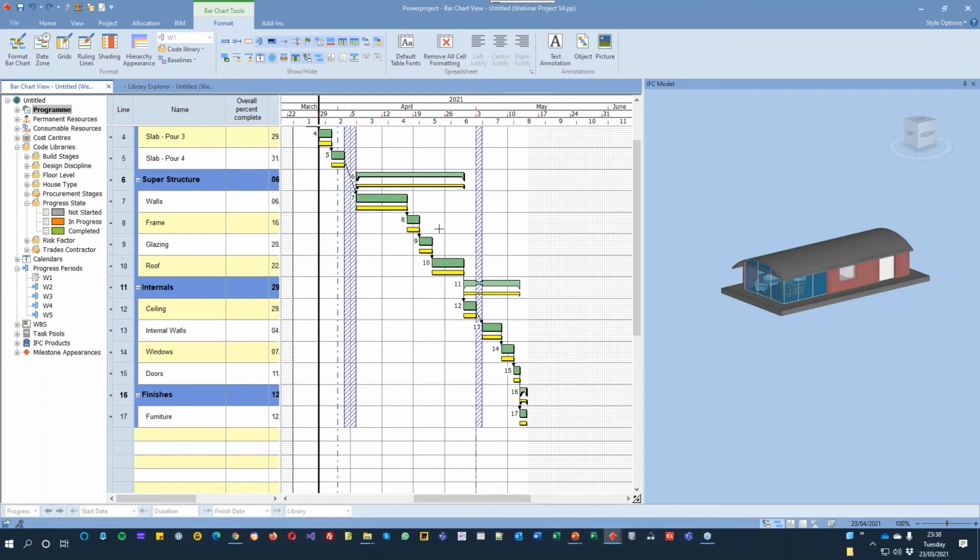So for every baseline, and you can create as many baselines as you want. Again, what we would recommend as you go through this sequence, every progressing period you go through, which may be weekly and so forth, you can baseline and create a new snapshot of what it looks like. So you've always got that to refer back to. And that's part of building up this repertoire of data that you can report on at any point. So we've got that set up in here.